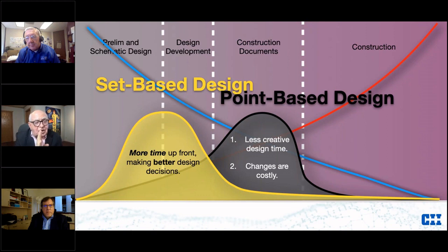We have an estimated cost for this project and what it will cost us to do it on the street. Then early on in design development, probably, the team will pick a target cost, which is below that, an aspirational target cost. We're really going to try to hit it. And interestingly enough, because the delivery of target value continues through construction, we'll actually be able to hit that and maybe improve on it.